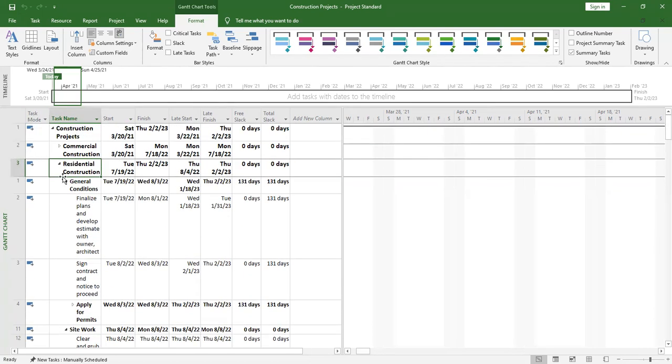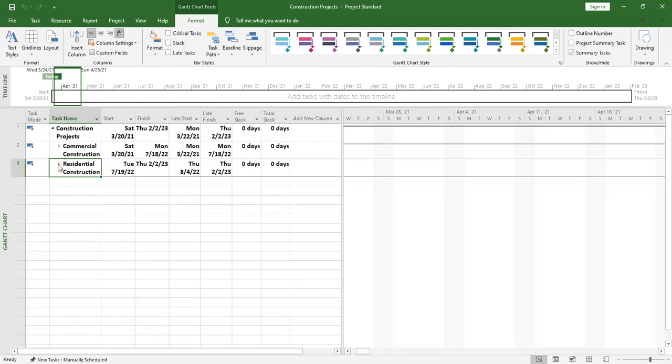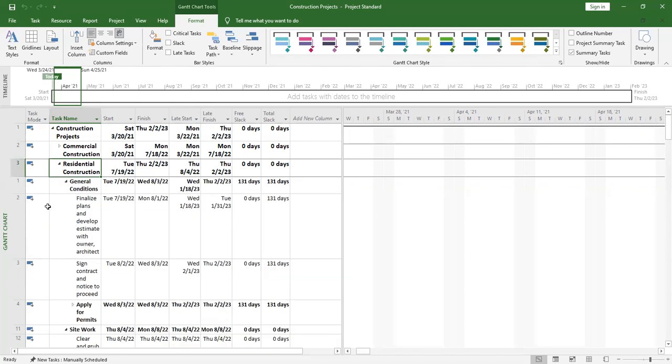The way you're seeing this, it is also trying to mimic the same concept, but now it is being viewed in a different way. A work breakdown structure is named according to the levels. The topmost level is named with 1 or 1.0.